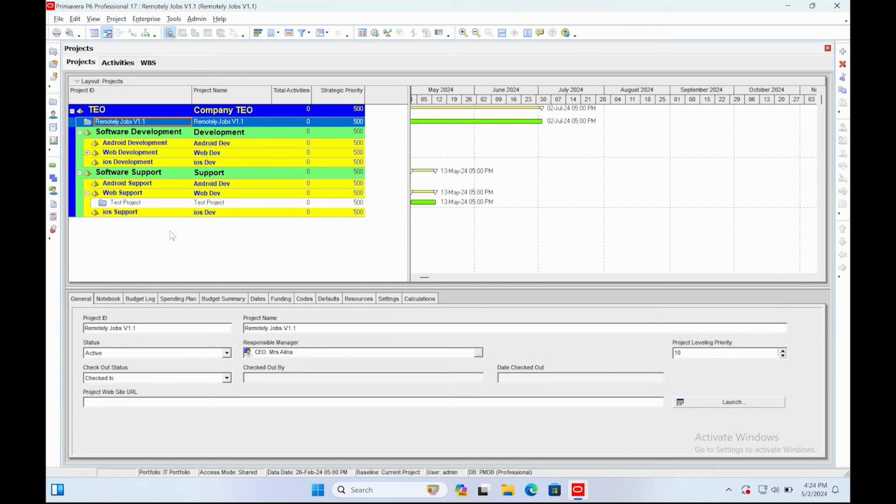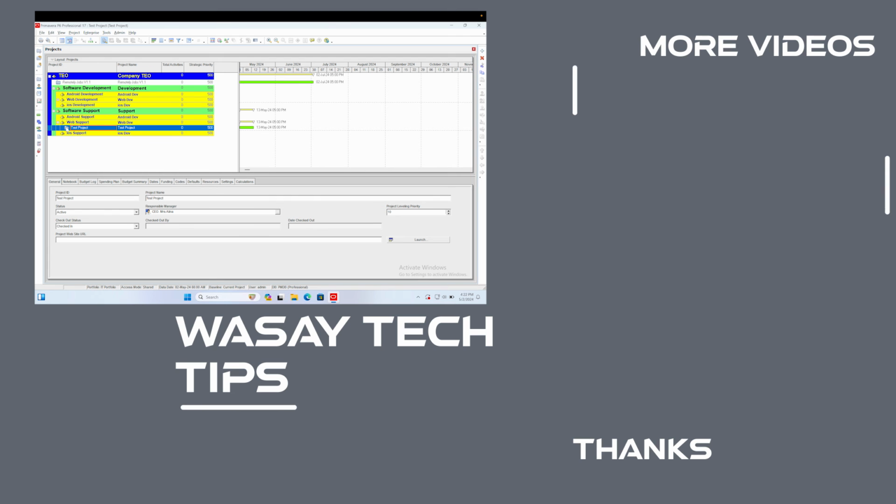And the last thing that I want to tell you, that this process is not 100% accurate of converting MS project file and importing it into Primavera. Maybe some of your activities or dependencies are broken or lost. Maybe some of your estimations become incorrect. So do double check it when you import the project in Primavera and make the necessary changes, because this process is not 100% accurate, that you should know. So yeah guys, in this way you can import an MS project file into Primavera.